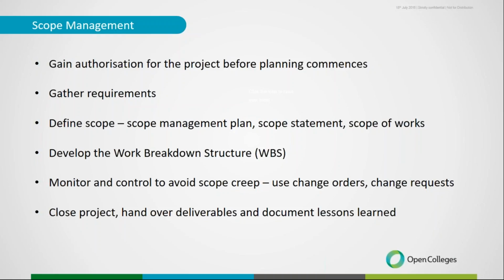But you'll have that document where you will say, this is what this project's all about, this is what we're delivering, this is what's in scope, and this is what's out of scope. And that's just as important, because there's no point saying, this is what we're going to be delivering, we're going to give you a 3-bedroom house with landscaping, and I think that means that I'm getting a pool, but you think, no, you haven't documented that as a pool.